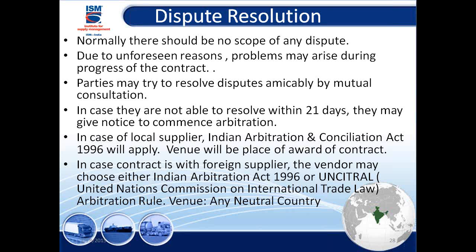If it's a local supplier, Indian Arbitration and Conciliation Act of 1996 will apply. And if it is a foreign company, as I told you, they use UNCITRAL, United Nations Commission on International Trade Law. So the venue for that has to be a neutral country. You don't want to be biased. It has to be totally neutral country. As I said to you, in many cases in the private sector I've seen, it happens in Singapore. So this is where in majority cases, even if you look at all the MNC companies, at the back they write down in very small words, arbitration venue would be so and so.